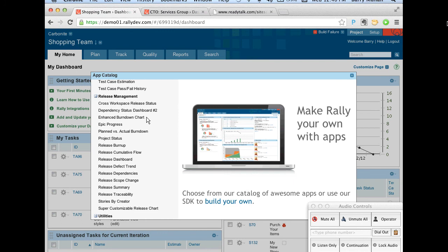Yeah, interesting. Because definitely our release planning envisions a cadence-based planning approach. Well, it's for web nowadays, teams are looking for continuous deployment, right? I check in my stories, accept it, it's live. And then for iOS, you don't want to do that so much because you have to wait a week for Apple to go down to their level and accept your application. Right. And then for Android, it could be quick, but you don't want it too quick because you're going to drive your customers crazy.